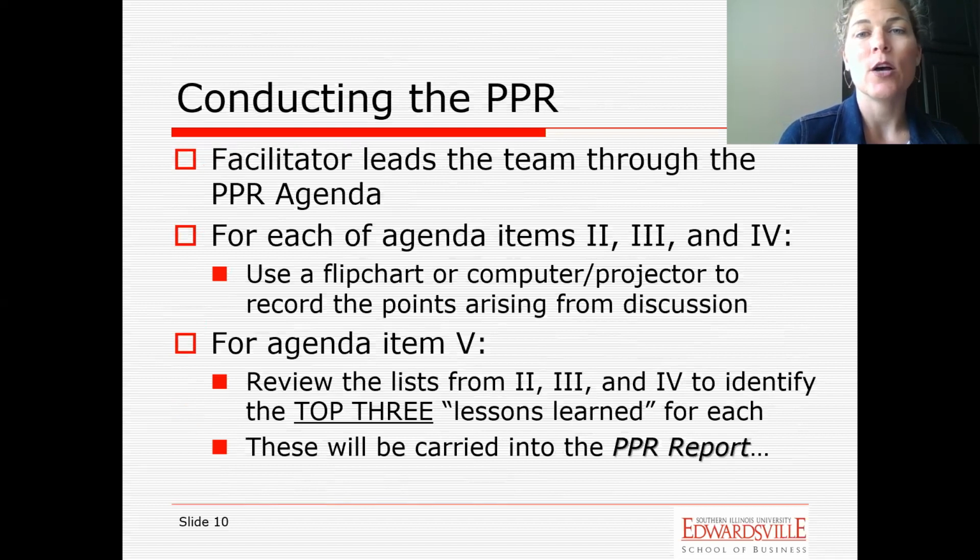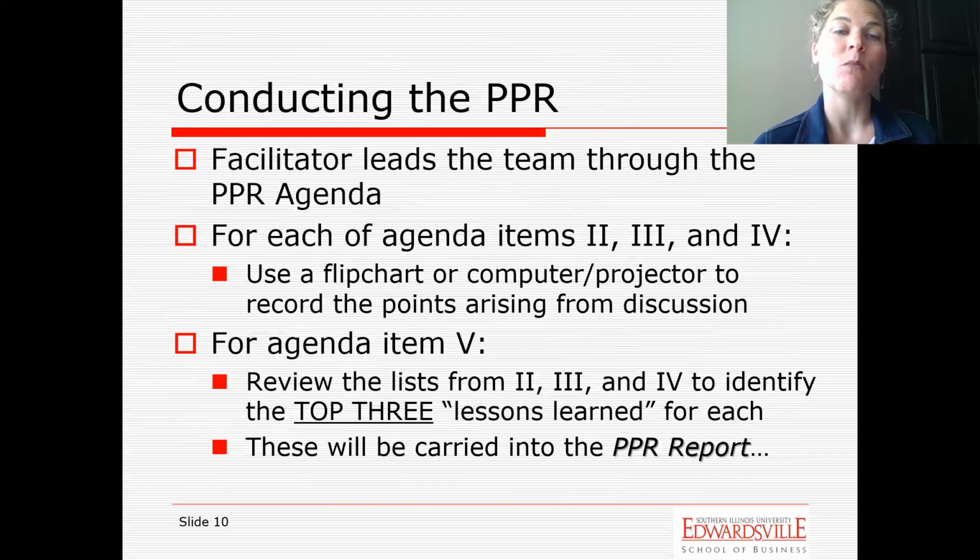The facilitator would help document the discussion, maybe with a flip chart, or recording it on a computer and projecting it so the group can see the items they've listed out. And then the facilitator would help review that list and talk with the group to get to the top 3 or top 5 lessons learned. All right, and those are the things that would then be carried into the actual report.